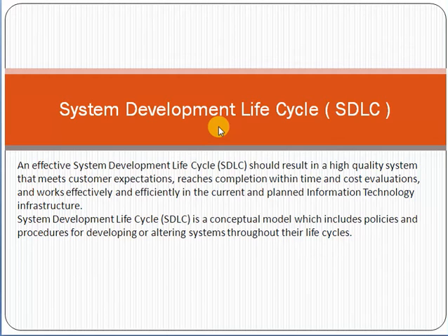After that, the maintenance phase will also occur, where you have to provide maintenance. For example, normally 10 to 15 days is the maintenance period, and after 15 days it goes to production support, where the operation support team will engage. So this is a very common approach of system development life cycle.